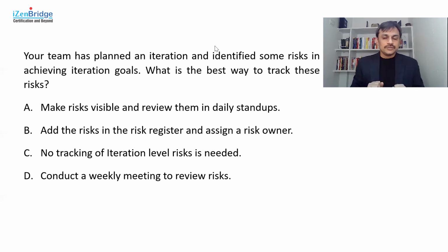So the best place to talk about these risks is the daily stand-up. Maybe while you are concluding your daily stand-up, you review whether there is any risk which can derail our plan. If it is true, then we should plan differently for our upcoming 24 hours. You can put them into your tracking board, risk board, whatever you are using, and before you conclude the daily stand-up, you may review them.